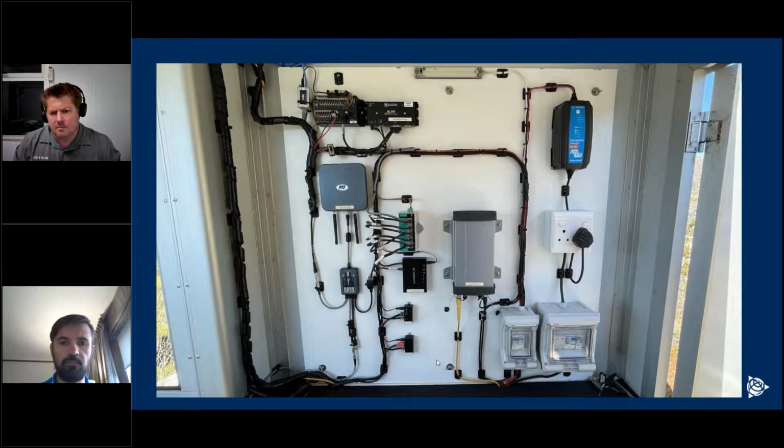So these electronic boards are what we tend to build up in the workshop before we take it to site. And as you can see, there's quite a lot going on. So if you have to build up all of this on site, it will take quite a long time.